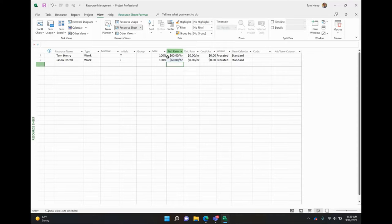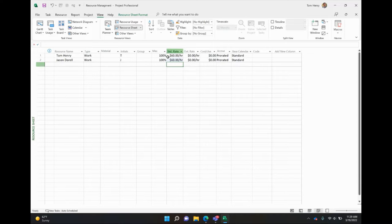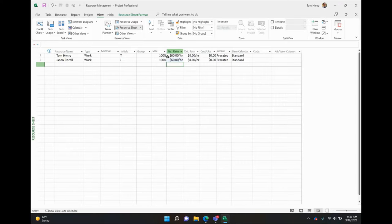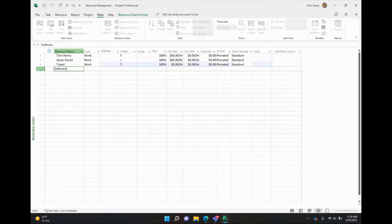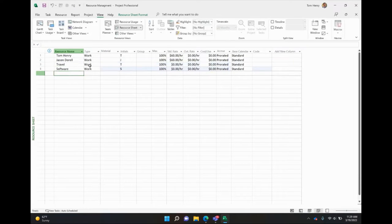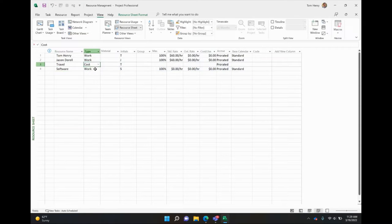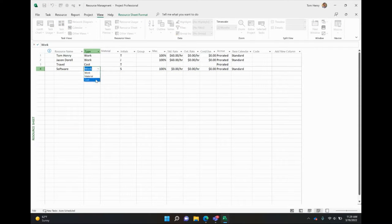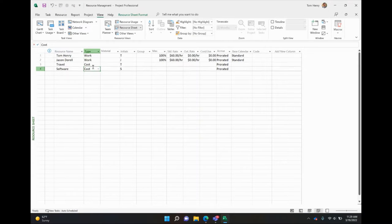The second thing we might have to take into consideration is any fixed cost. Maybe contractors where they just give us an invoice or maybe expenses for travel where people give us a travel receipt and we want to give them their money back. Any kind of fixed costs that we don't want to track on a prorated basis, but just a fixed cost. That's going to be things like travel, maybe software. And this is the type cost resource. This is the second type I want to talk about. There's three types, work, material cost. The first type is a work resource, that's a prorated cost resource, fixed cost.